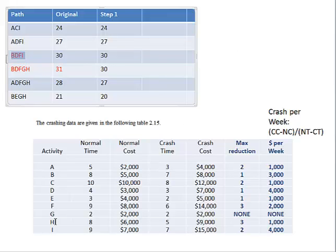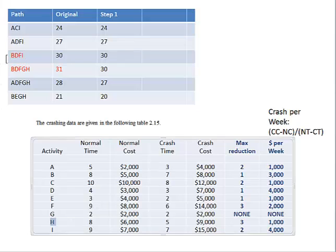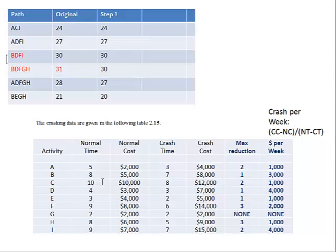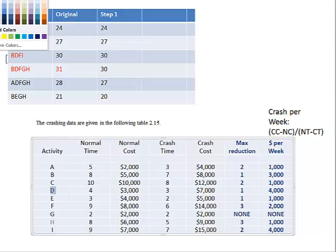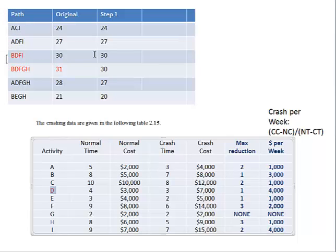Now we have BDFI and BDFGH both at the same length. H is done — mark it off. Next we have to crash two paths simultaneously: BDFI and BDFGH. First, see if there is a common activity in both paths — B, D, or F are common in both. B costs $3,000 per week and D is $4,000 per week. Eliminate D because it exceeds $3,500. You can also eliminate I if it ever comes into play.